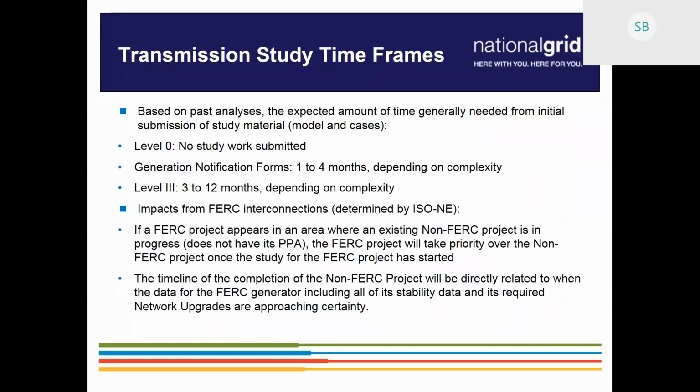This slide here provides you the study timeframes based on the different levels of analysis. Based on past analysis and also based on the Planning Procedure 5-3, for a level 0 interconnection, well, there's no requirement to do any analysis, so there's really no time frame for that. For notification forms, though, depending on the area complexity that could take between 1 and 4 months, right?